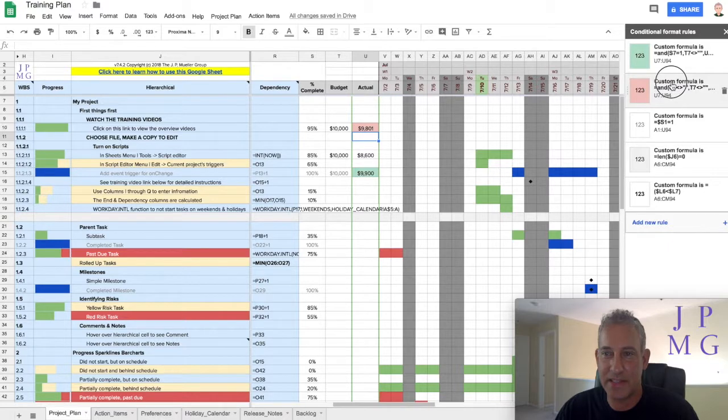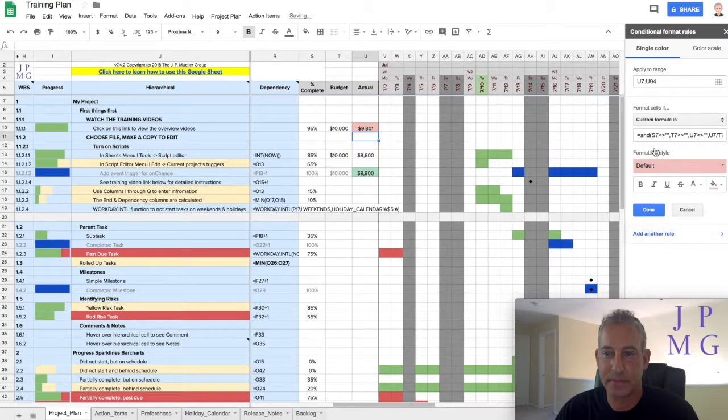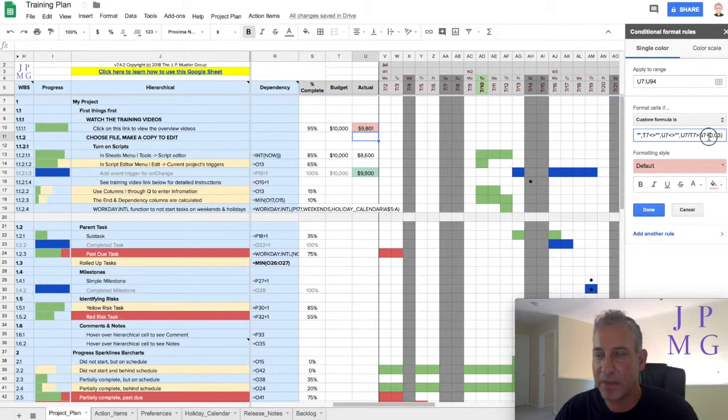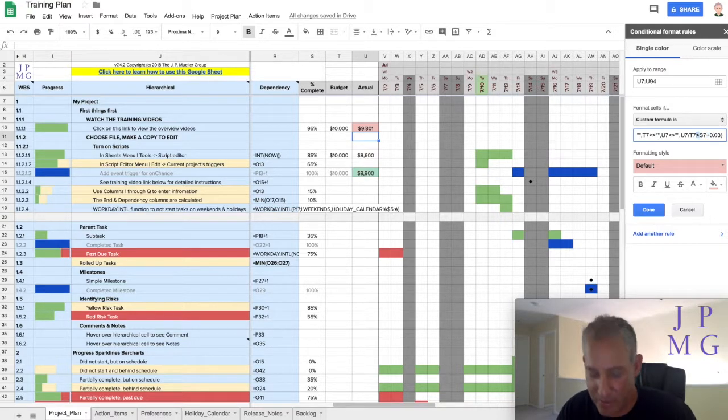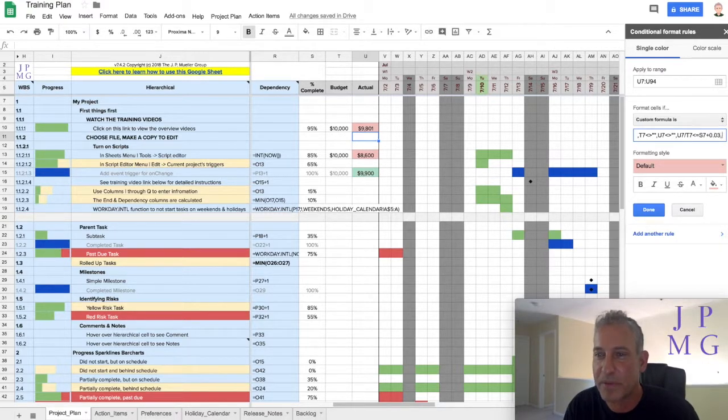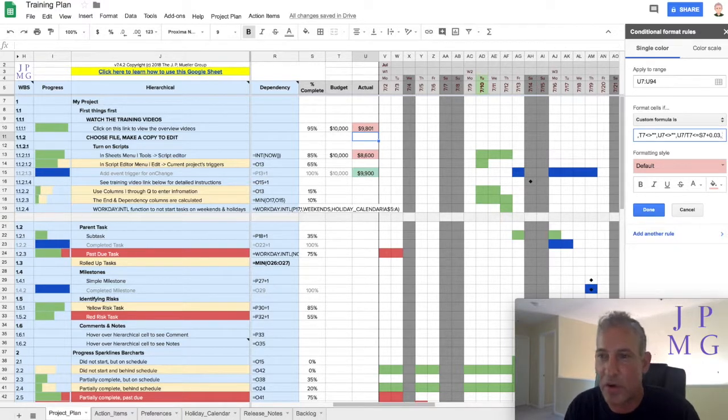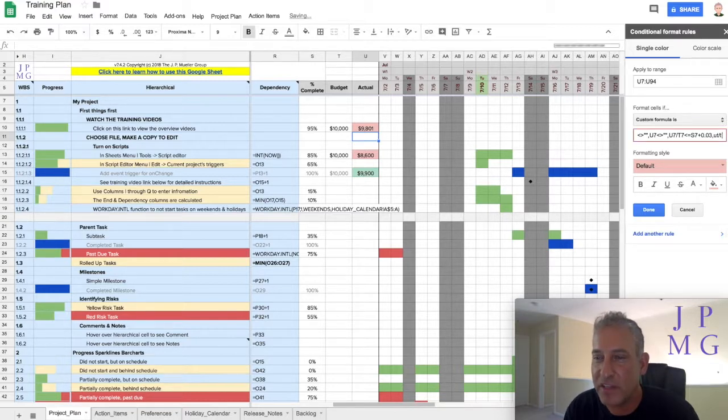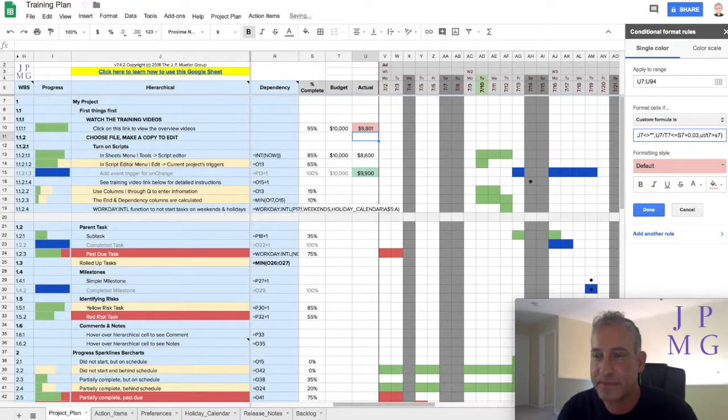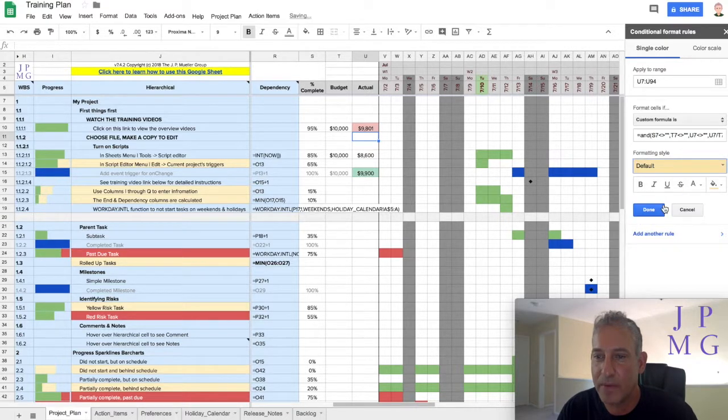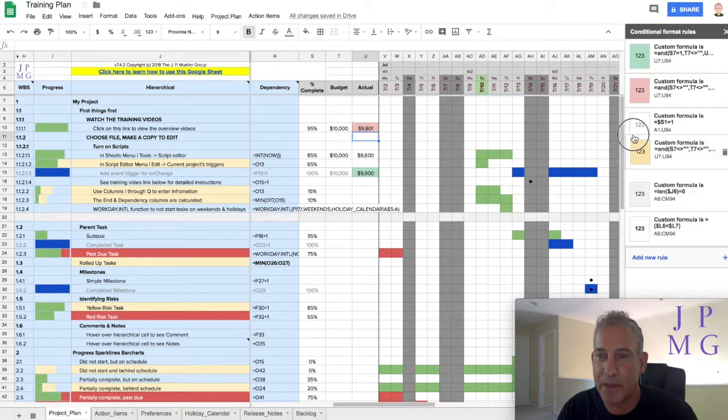The last thing I'm going to do is create one for yellow. And in this case, I'm going to say that it's less than or equal to S7 plus 0.03. But I also want it to be greater than, so I want U7 divided by T7 to be greater than S7. And I'm going to make those yellow. And again, I'm going to drag that up.